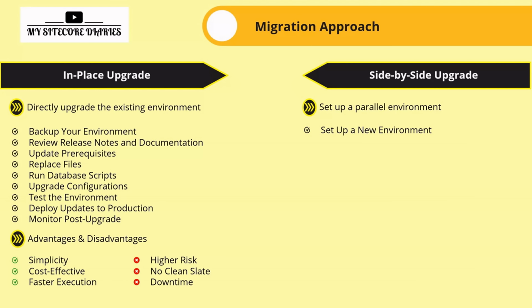First point is that you have to replicate your production environment. So you have to create a new, non production environment on which you are going to do the upgradation. The backing up of the existing environment is a very key point for any approach. Then content migration: you have to migrate your content from the old version to the new version.